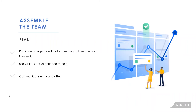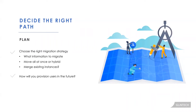In planning, consider the right migration strategy for your organization. A key question is: what information do you actually want to migrate? This is an opportunity to start fresh with a clean, relevant dataset. For Confluence, not all spaces may need to migrate — some can be archived. Similarly for Jira, finished projects don't need to be moved across. Some mid-sprint projects may be easier to restart fresh in cloud.